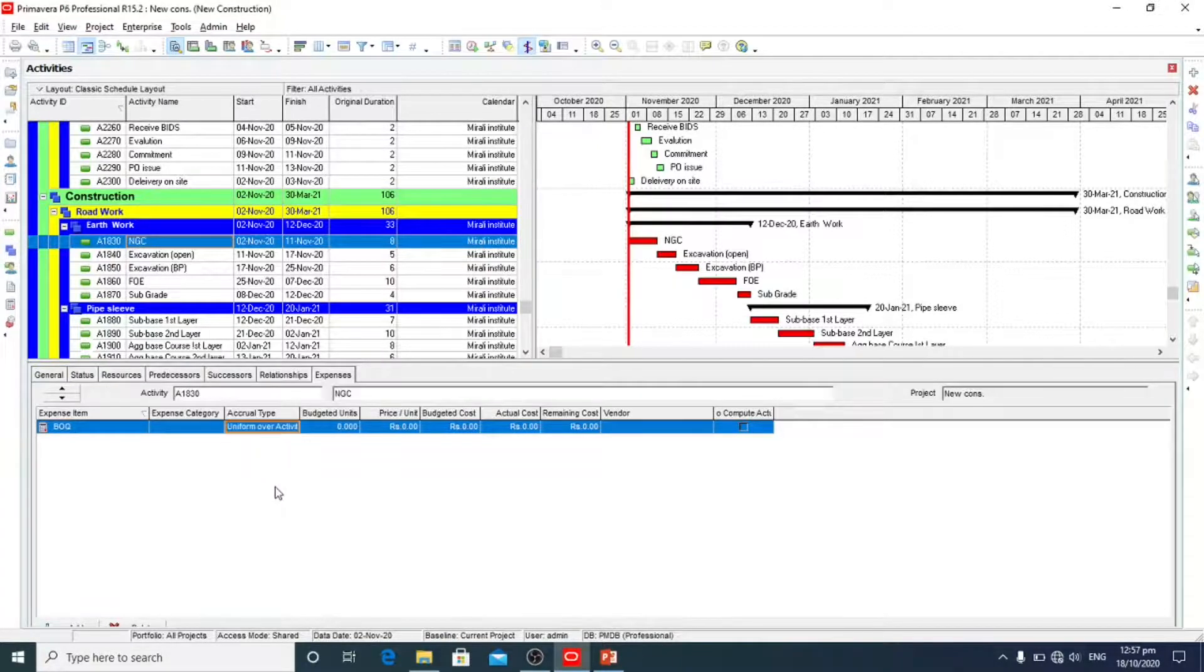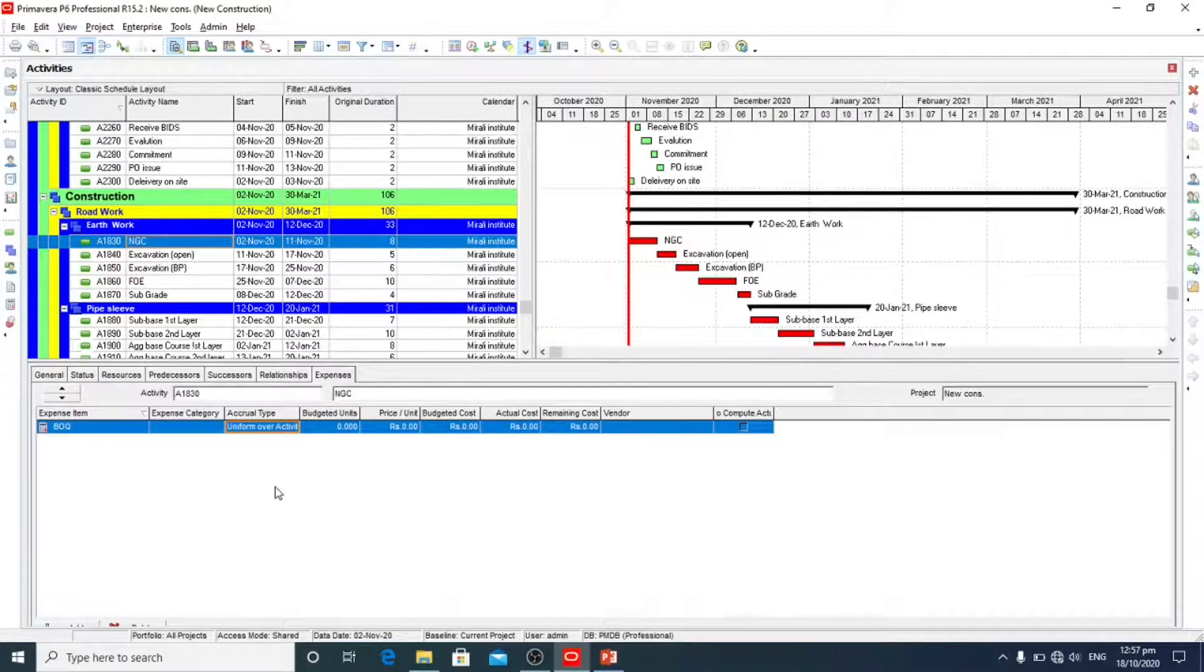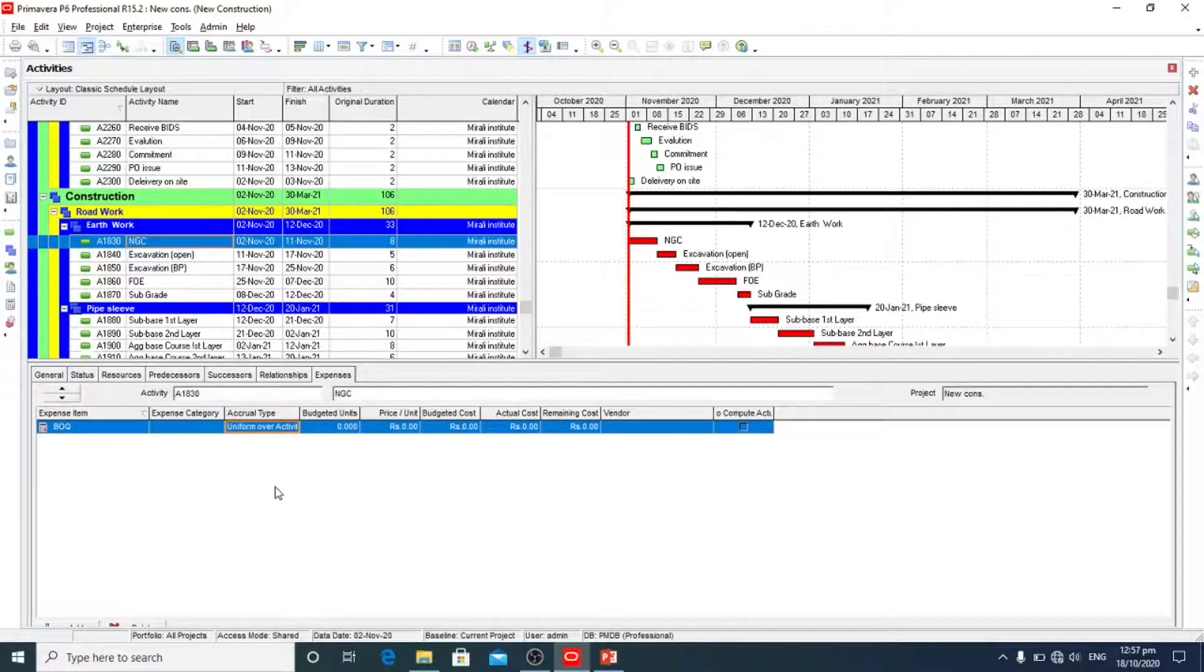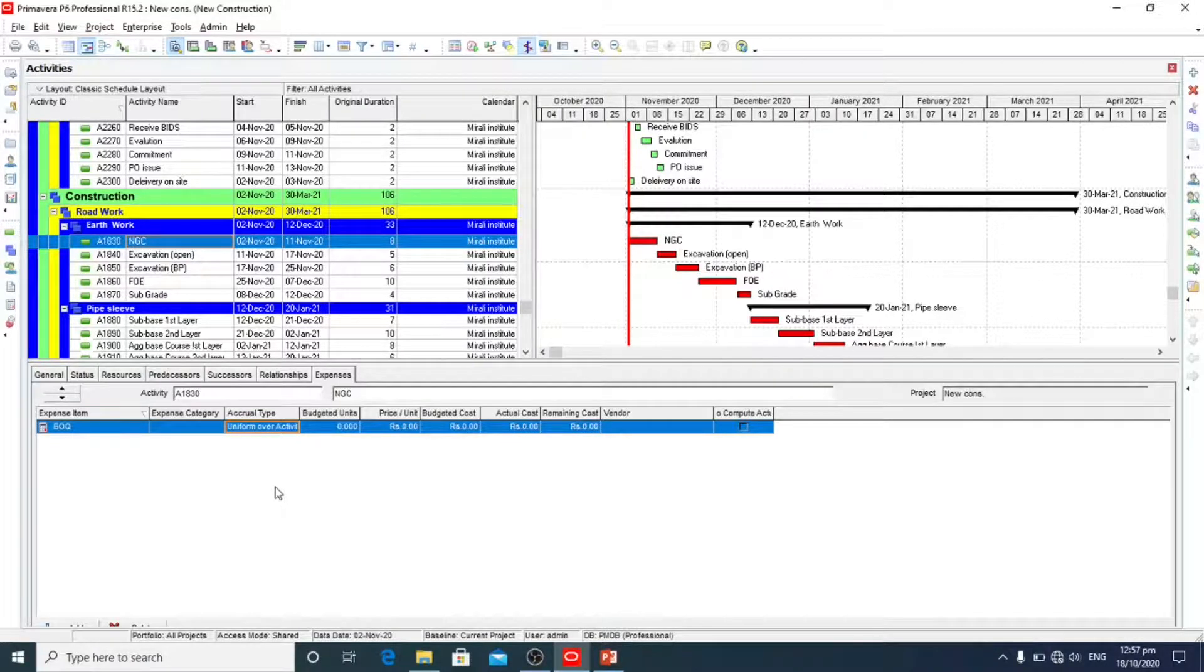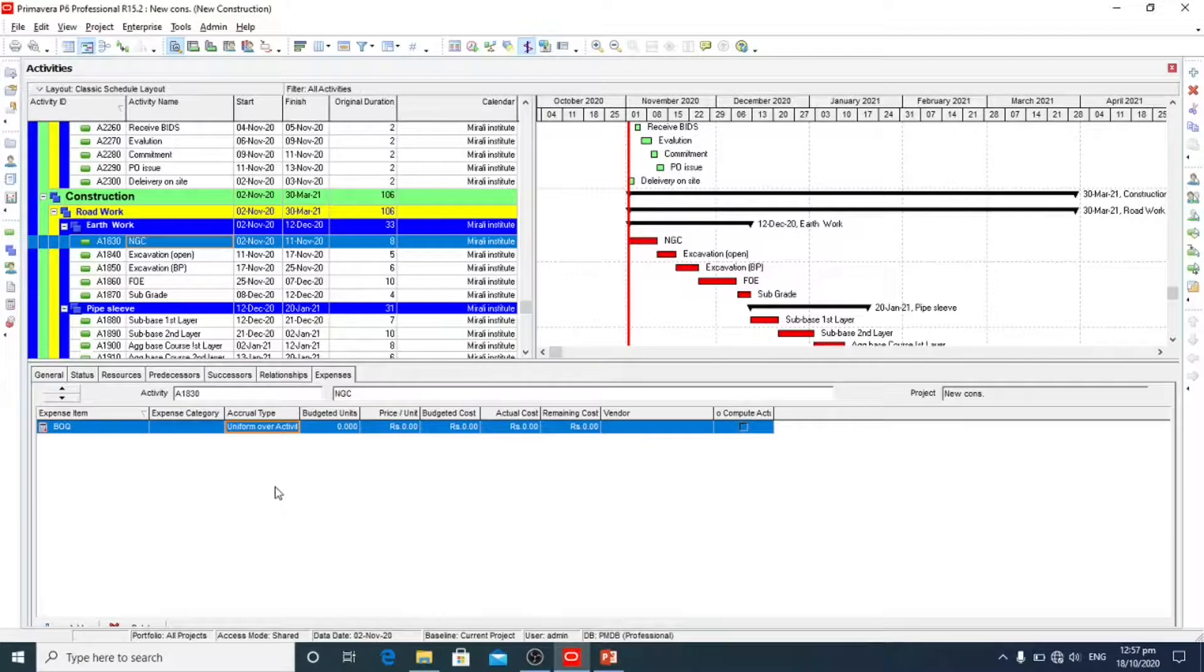It shows the distribution of the cost with respect to the activity. We will keep uniform over activity that helps us when we generate cash flow diagrams and S-curves.